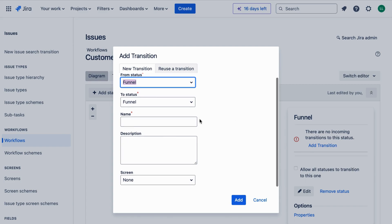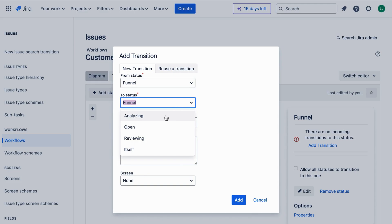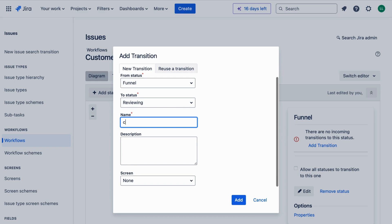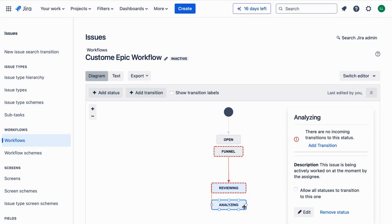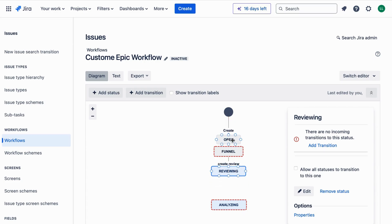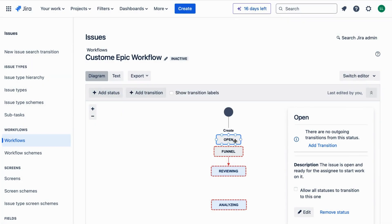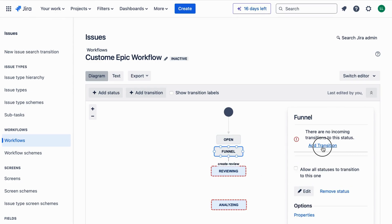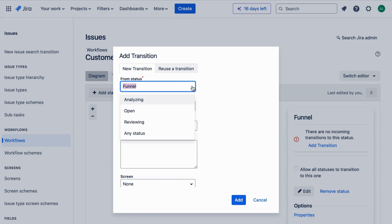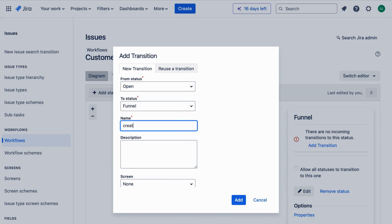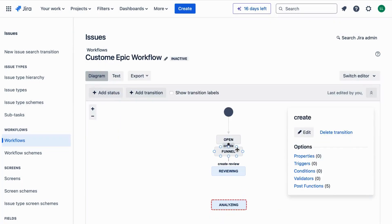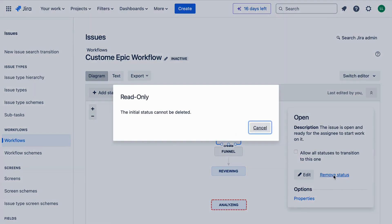Now that we have all our statuses, we need to connect them with transitions. Transitions are the actions that move an issue from one status to another. Click on Add Transition and name your transition — for example, 'Start Review' for moving from Funnel to Reviewing. Add transitions for each status change: Reviewing to Analyzing, Analyzing to Implementing, and Implementing to Done.